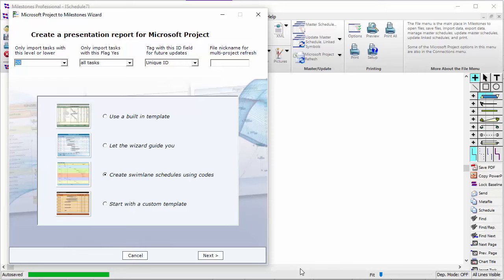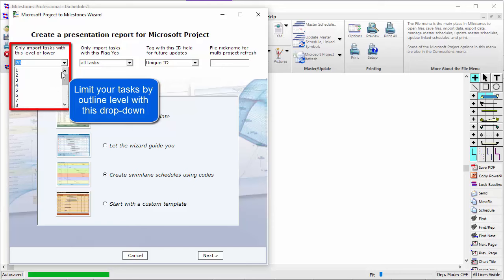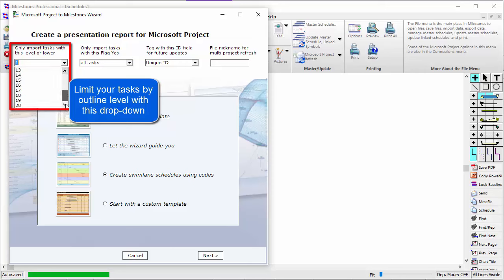First, you can limit your import to upper level tasks only. For instance, if you just wanted to bring in Outline Level 1 tasks, you would choose 1 in this drop-down. Since I want to bring in everything, I will choose 20.